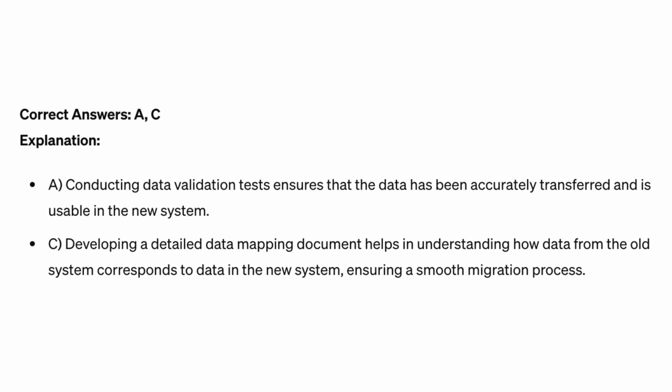Correct answers A, C. Explanation. Conducting data validation tests ensures that the data has been accurately transferred and is usable in the new system. Developing a detailed data mapping document helps in understanding how data from the old system corresponds to data in the new system, ensuring a smooth migration process.